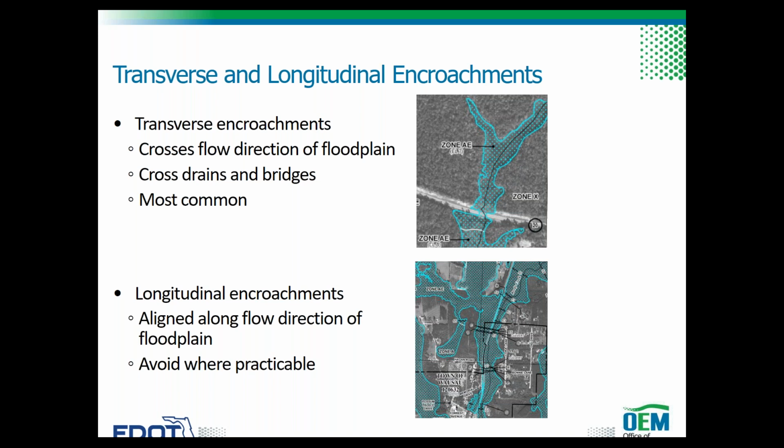Most encroachments for roadway projects are transverse. Longitudinal encroachments should be avoided wherever practicable, since they tend to result in substantially larger impacts.